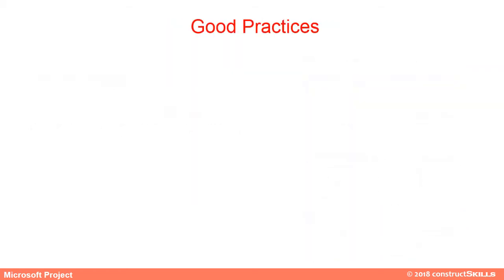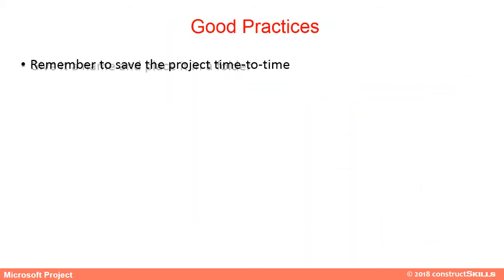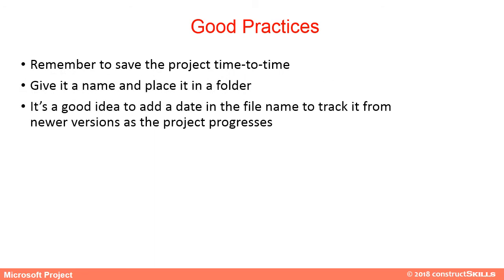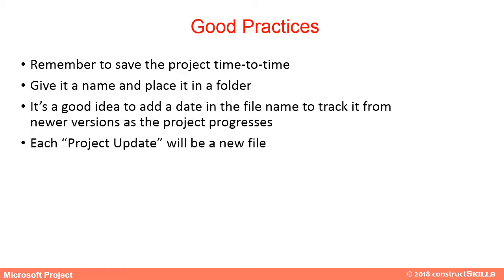It is good practice to save the file from time to time. It is a good idea to add a date in the file name to track it from newer versions as the project progresses. Each project update should be saved as a new file.